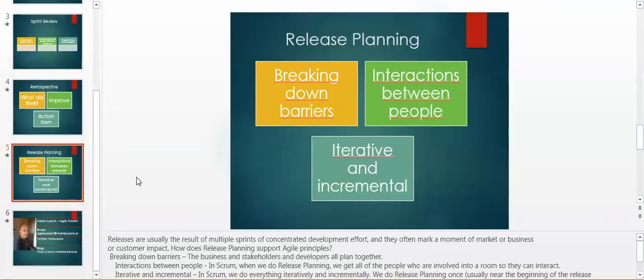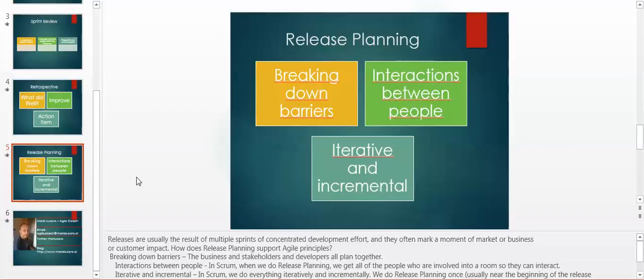Another important meeting is release planning. Releases are usually the result of multiple sprints of concentrated development effort, and they often mark a moment of market or business or customer impact. How does release planning support agile principles?